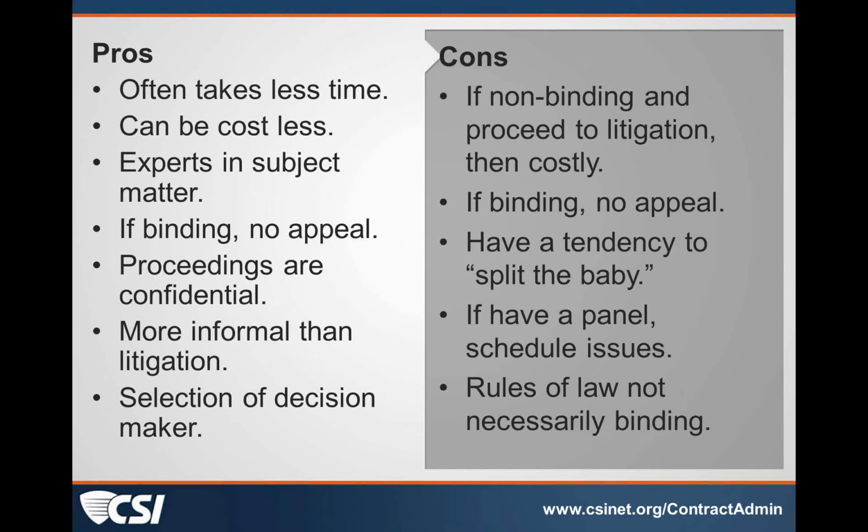I'm not going to answer any more RFIs and review any more submittals, and the contractor's sending this stuff in and can't proceed with his work because he doesn't have answers to his questions or his submittals approved. That would be a situation where a dispute between an owner and a designer or architect can delay the construction